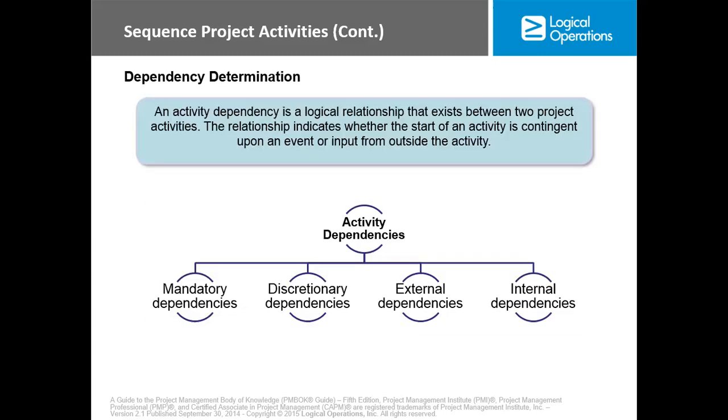Now, external dependencies are those where an activity depends on an external activity. For instance, when you're waiting for an auditor or an audit to take place, that we refer to as an external dependency.